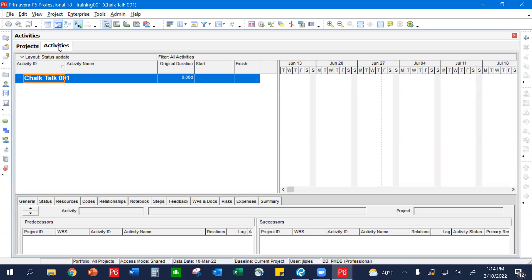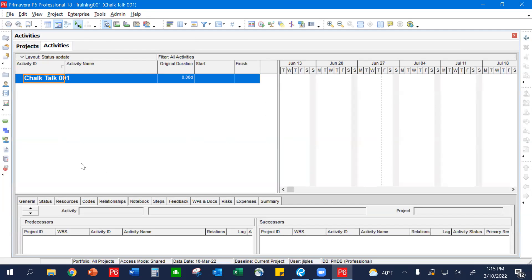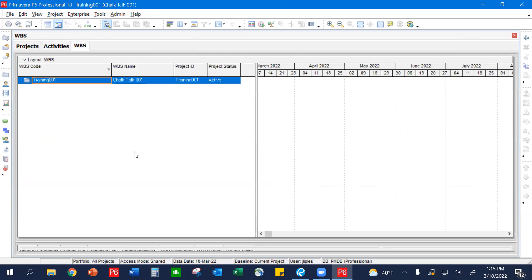That'll bring you to this screen — nothing has been created yet because we're still in the process of making the schedule. Up here you'll see the Activities tab we just opened, and you can scroll back and forth between Projects and Activities. The first and most important thing to do here is start with your WBS breakdown. You'll come over to the left ribbon and you'll see this icon — it'll show up as WBS. You want to open that activity window, and here's where we're really going to start building our schedule. Your WBS's are going to be represented as your phases during construction.